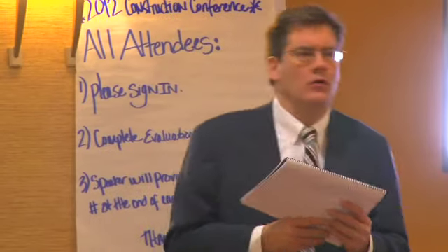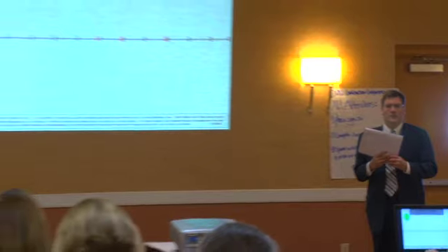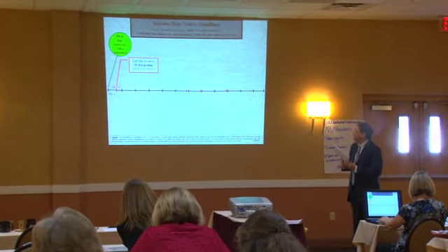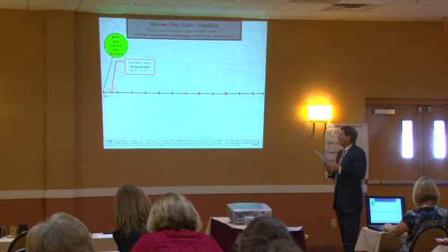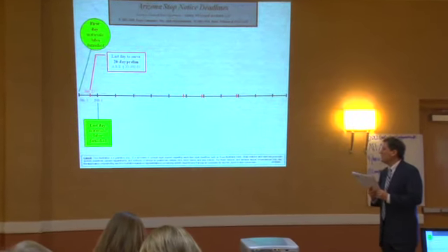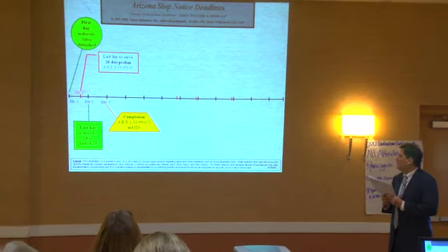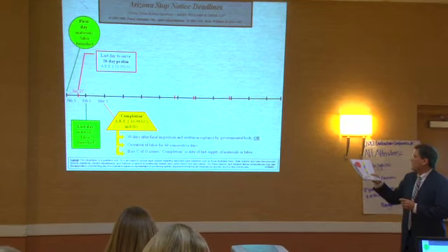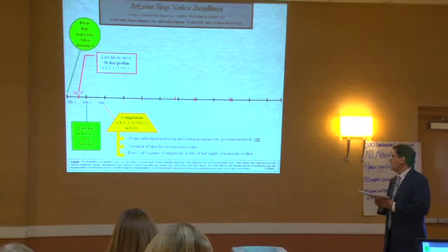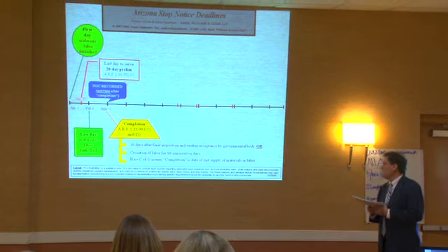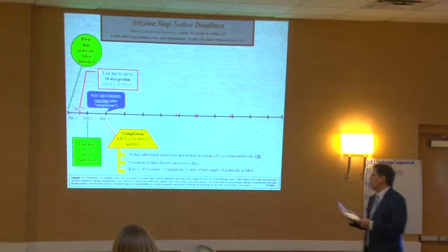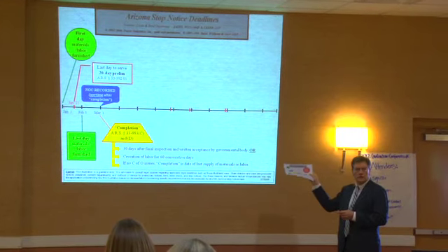This timeline works almost exactly the way a lien claim timeline works. On this hypothetical, again, January 1 you supplied the paint. January 21 your last day to serve a preliminary notice. February 1 is the last day you supplied paint. The completion in this hypothetical is March 1, defined as 30 days after the certificate of occupancy issued, cessation of labor for 60 days, or no C of O issue. Completion is the last date of supply of materials or labor. Note that the third point is the shortest of these three.